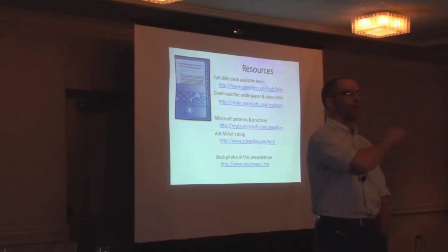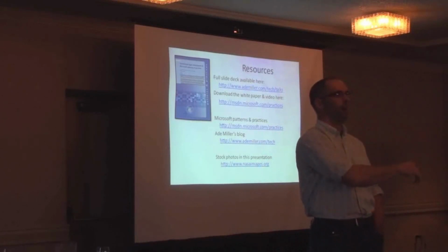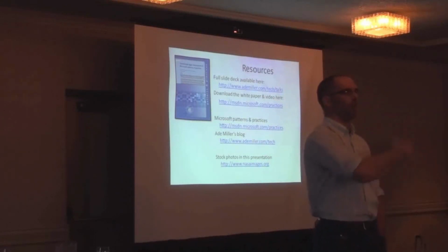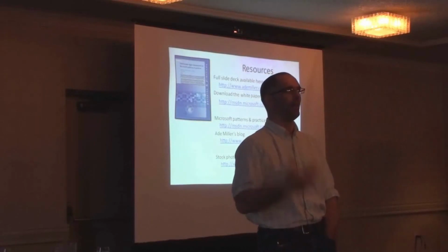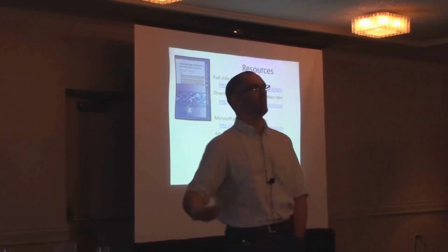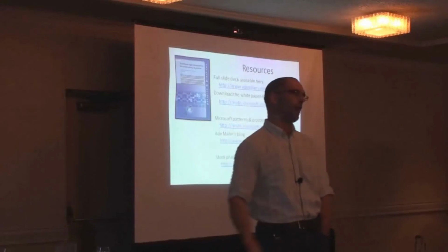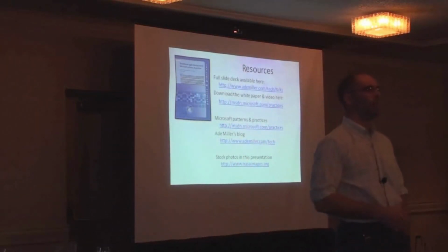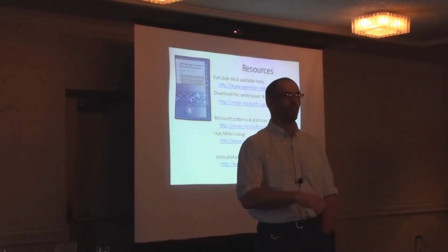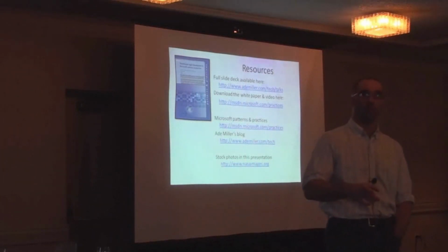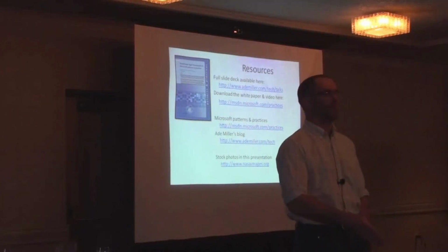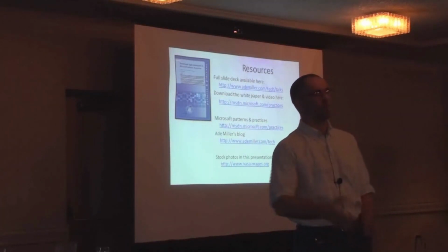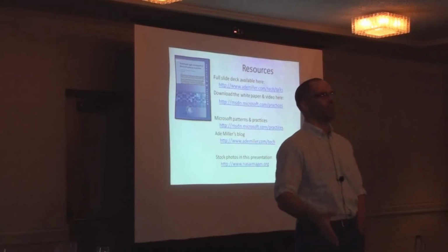The guy on the west coast of the US starts the story, gets halfway through it, and checks in the results with all the tests. The next guys pick it up as they come online at the beginning of the day. They do some work on it. They then pass it off to the third guys in Singapore who hopefully finish it up. There are some interesting things about that approach that we learned from doing the whole testing remotely: you better have your act together at the end of the day, because otherwise you ain't going home, because you're going to basically ruin the next guy's day.